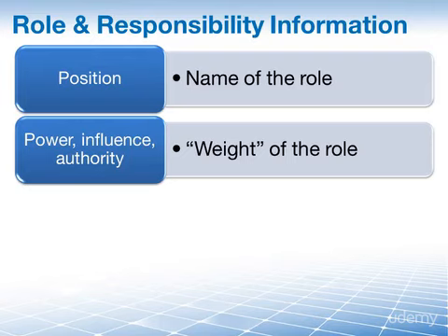Make sure that you define this weight for everyone, but also make sure that you match the authority with the appropriate responsibility. By the way, according to the PMBOK guide, authority means the right to apply project resources, expend funds, and make decisions or give approval.